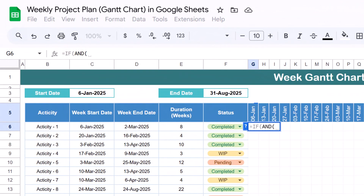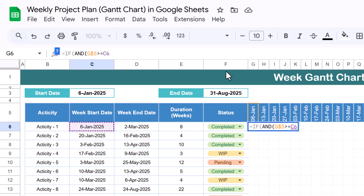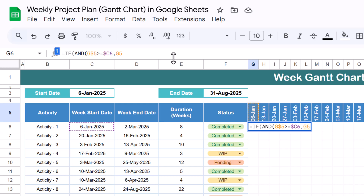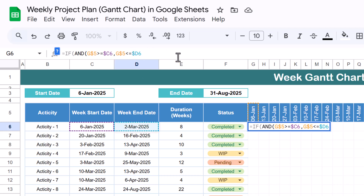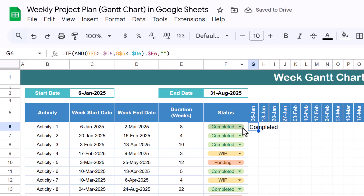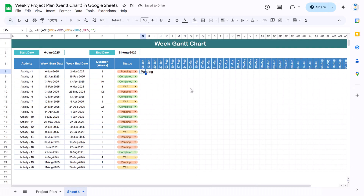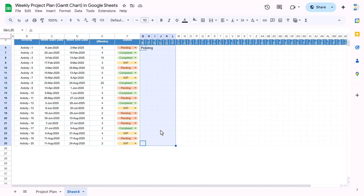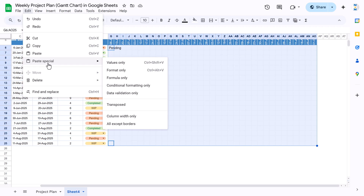Now we'll put the formula in the timeline cells. Use an IF with AND: if this date (with $ before the row number) is greater than or equal to the week start date (with $ before the column letter), AND this same date is less than or equal to the end date (with $ signs fixed), then show the status value (with $ signs). Otherwise show blank. Hit Enter — it shows 'Completed'. Change to 'Pending' and it shows 'Pending'. Copy this formula and paste as formula-only across the entire timeline range.